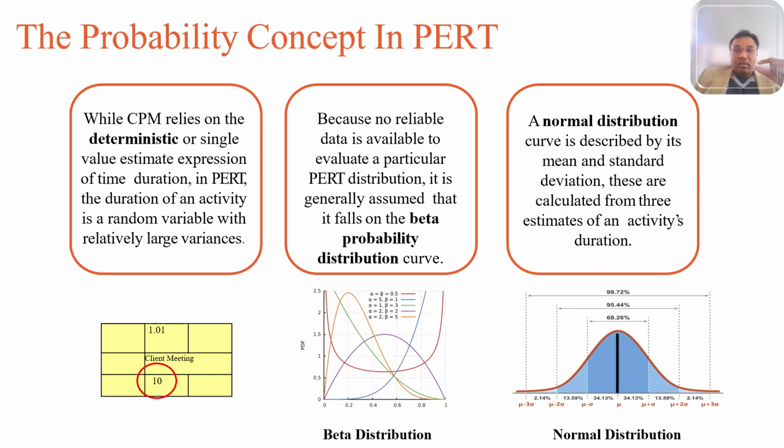In the following slides, we'll go through what those are in detail. And using this 3-point estimate, PERT models each activity duration as a random variable, which they traditionally call a beta shape. So if you look at the center one, that's your beta distribution, how each activity could be; you need to work on different points of that estimate.